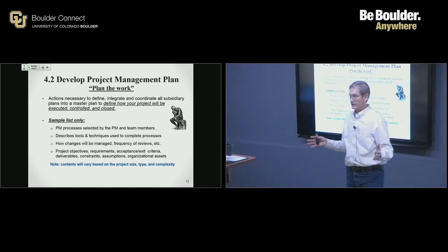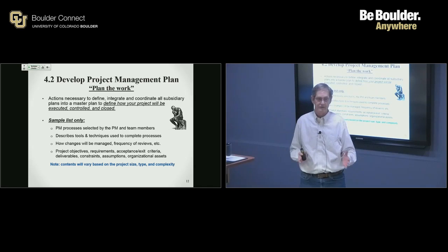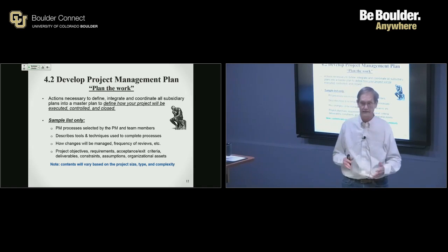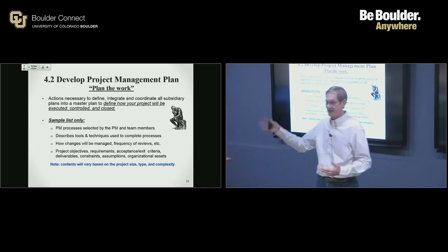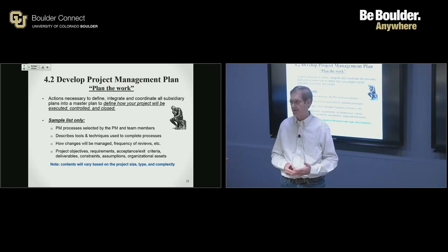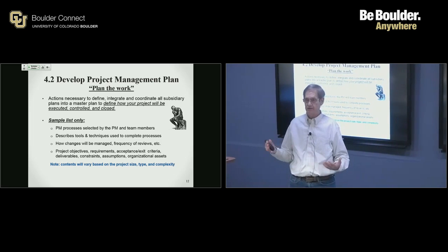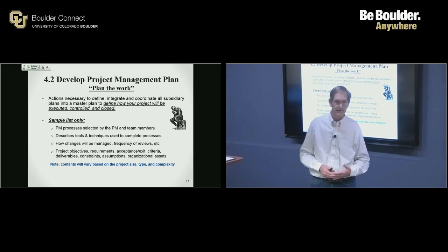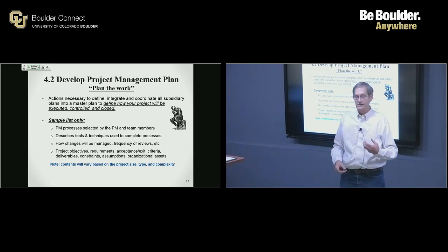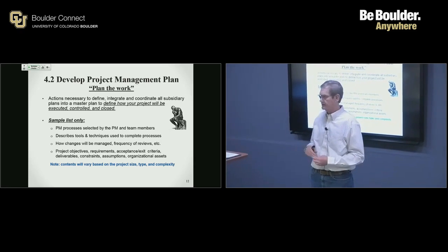I started out with a core team of 12 people. Only 2 or 3 of us had Microsoft Project, the scheduling tool, the software product, the license. And so I had to go out and buy a bunch of licenses just to start the project. I had 38 team members on the project team. And at the time, I was going to have to buy 38 licenses at $1,000 a pop. Plus, the tool is very robust. Have you guys used Microsoft Project at all? Okay.